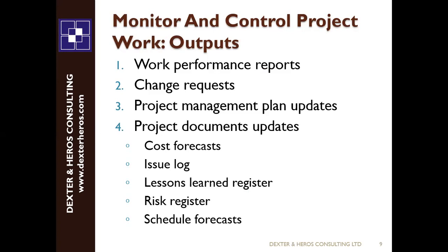If you recall, you can always make changes on your project without really disturbing the sponsor, as long as it does not affect these three areas: cost implication, extending the delivery date, and of course, additional work, additional specification, or maybe scope, as we may put it. You understand? Then you can make the decision. Once it does not concern these three areas, you can go ahead and make a decision.